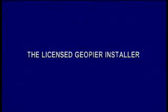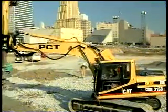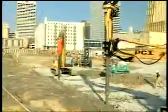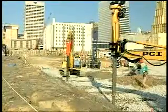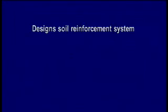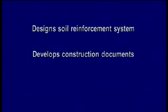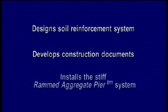The Licensed GeoPeer Installer is a specialized subcontractor who has been involved in GeoPeer design-built construction for several years. He designs a soil reinforcement system and has it reviewed and approved by GeoPeer Foundation Company, Inc., the Licensor. His design work may be done in-house or by full-time certified GeoPeer design associates. He develops construction documents, including project specifications, and he installs the stiff-rammed aggregate pier system using three major pieces of equipment per crew.